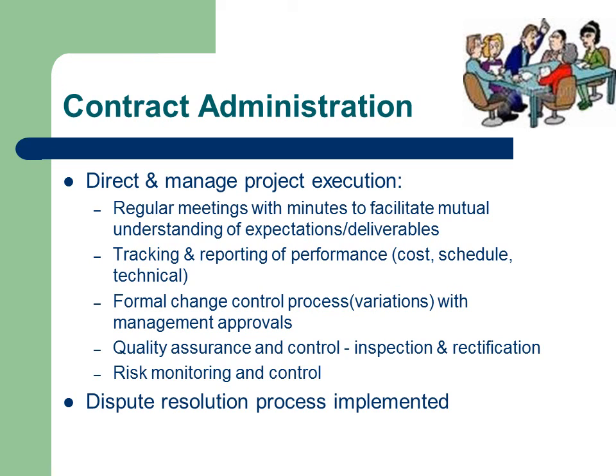Any changes to the agreed contract must be done according to an agreed change control or variation process, which must be approved by management of both parties. This process is part of the change control process discussed in Module 3, Scope Management. Should any disputes arise, then these should be handled using the procedures previously agreed and documented in the contract.